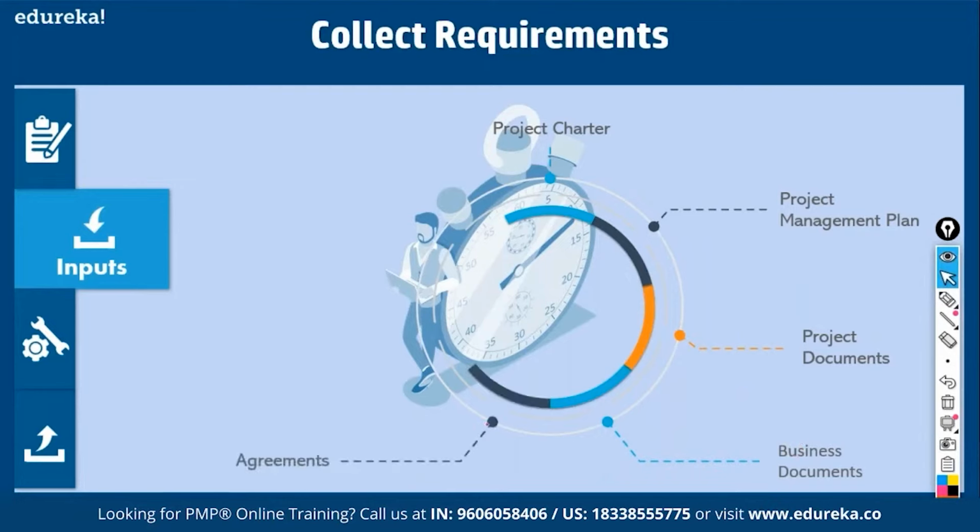Then agreements, what are agreements? Agreements are the agreements that you enter into with the customer. When you get a contract, let's say you're ABC company, you get a contract from XYZ company to deliver a product. The customer would have entered into an agreement with you. The agreement would contain a statement of work. What is a statement of work? A statement of work is a narrative description of everything that you, ABC company, must deliver as part of the project. So it contains all the requirements. So you look into agreements as to what you have to deliver. That will be the basis for collecting requirements. You have to go and talk to the stakeholders based on this statement of work and amplify the requirements in a much more detailed manner.